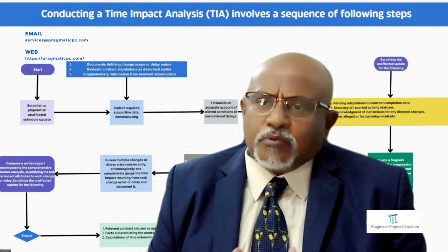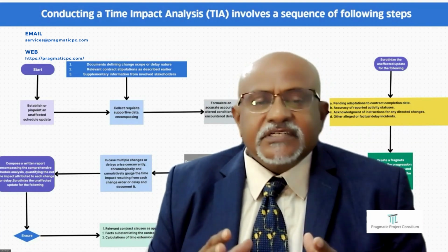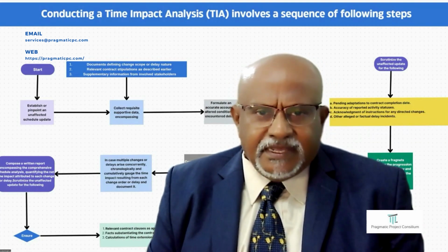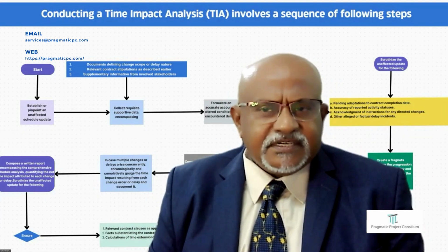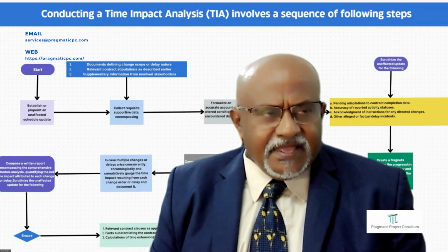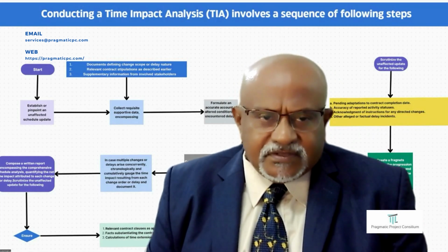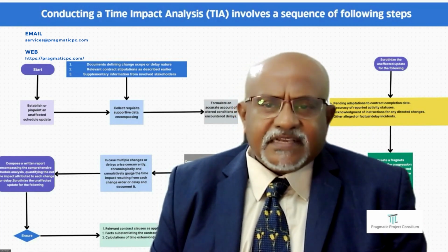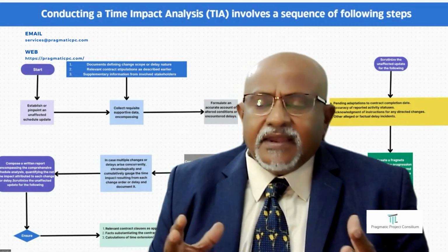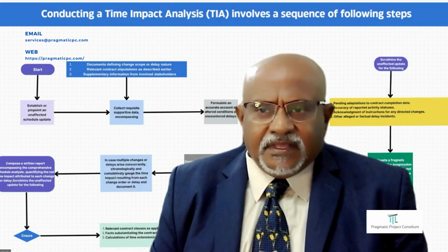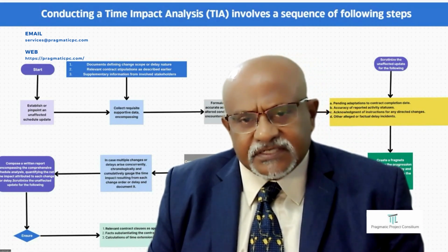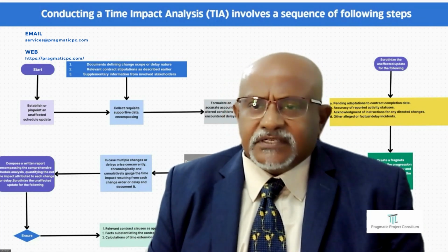likely the optimal approach for examining the project delays, we will concentrate on employing this method for constructing a delay analysis. A time impact analysis involves a time estimation procedure that leverages the current CPM schedule and fragments. Fragments to anticipate and illustrate the influence of modifications and delays on project completion.